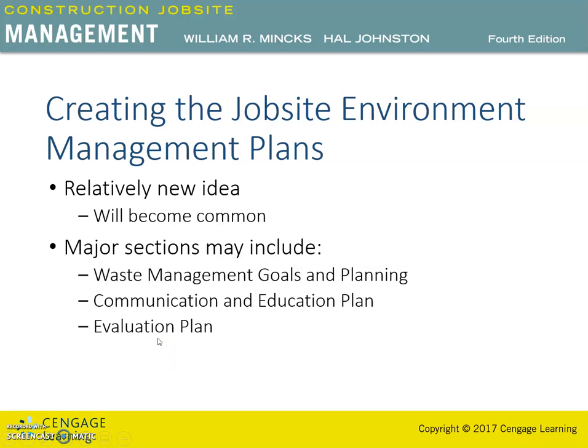Next is the evaluation plan. So the evaluation plan will include the recycling operations, tracking, communication checklist, short form waste audits, full waste management audits, cost and material tracking, and then the final report.